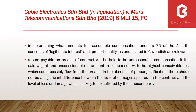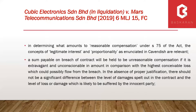What has shifted now is the onus — the employer is no longer obliged to show that the sum reflects actual loss incurred; instead, the contractor must show that the LAD sum is unreasonable. At present, the PAM 2018 contract — published before the Cubic decision — has yet to expressly take it into account. Perhaps future editions of PAM may expressly state that the sum is reasonable, reflects legitimate interest, and is proportional to overcome any challenges based on Cubic.